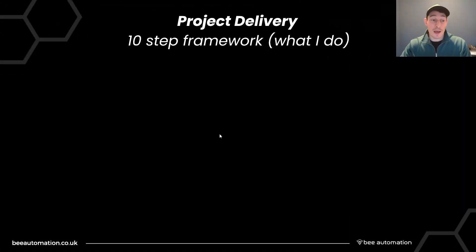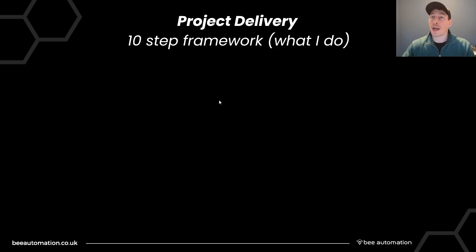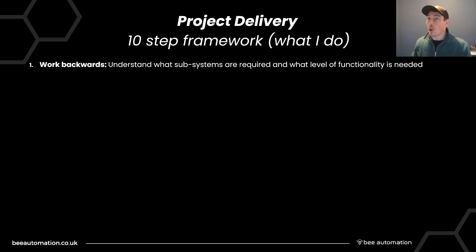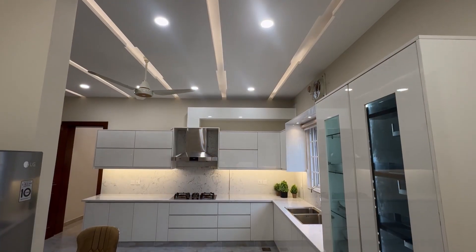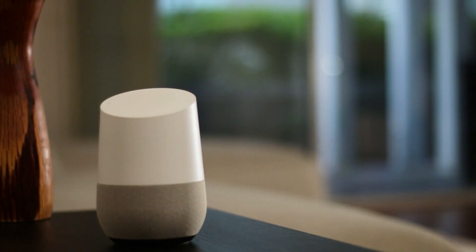This is how to deliver a smart home installation — my 10-step project delivery framework on a real-world project. The first step is to work backwards: understand what subsystems need controlling and what level of functionality you want from those subsystems. When I say subsystems, I mean lighting, heating, security, ventilation, access, and audio.